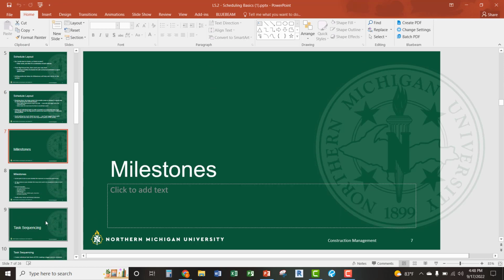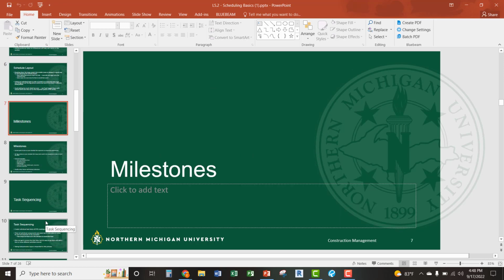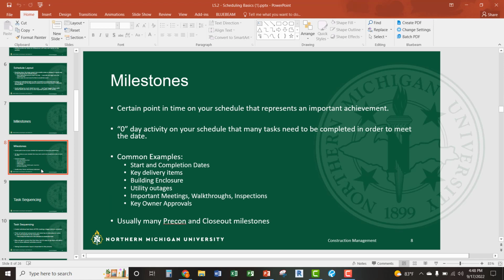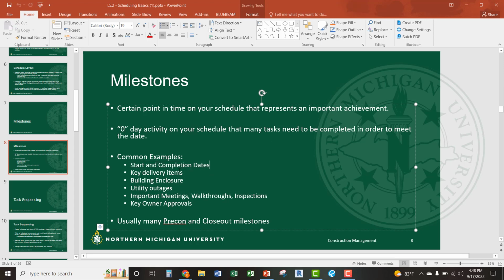Again, talking about milestones, these are your big markers. What is going to hold me up? What are some of those big times of a project that I need to hit? Obviously, start and completion dates are huge milestones. When are we actually starting this thing, and when are we finishing it, right? Key delivery items is kind of a big one too. So we're talking long lead items, some of our big mechanical units, maybe steel delivery, stuff like that. That's really going to shape our project.